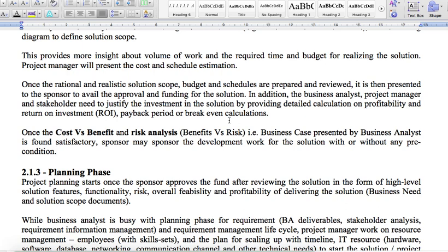It means that we are talking about the cost of the solution. That includes everything. It includes the solution as well as implementing the change, and the change will also include the increase in capacities if required, and also providing the training, and if you need to set up the operations for maintaining the solution, that cost is also involved. It's not just the cost of development. So you have to consider all these factors in order to provide the operating cost of the solution. So that is one.